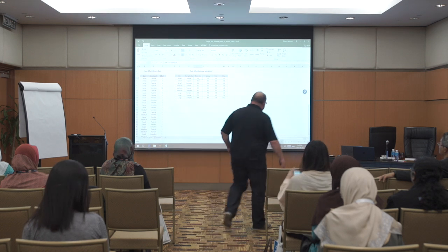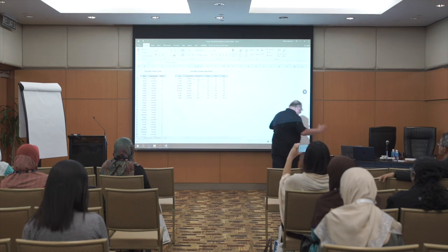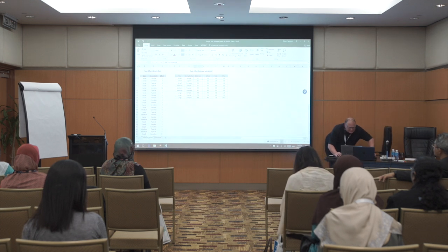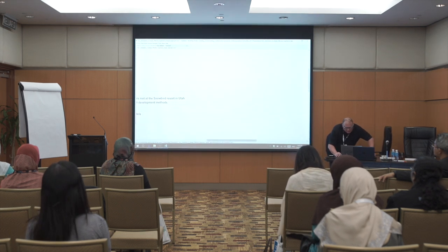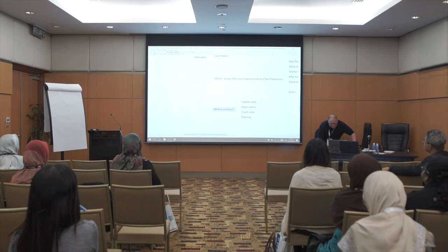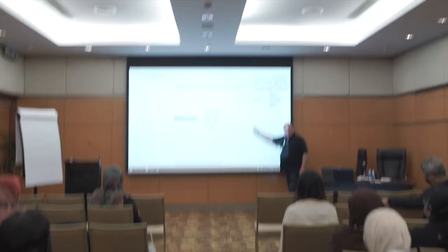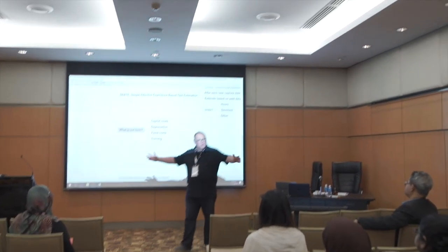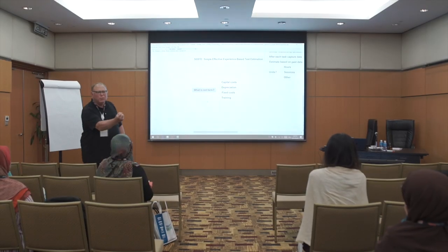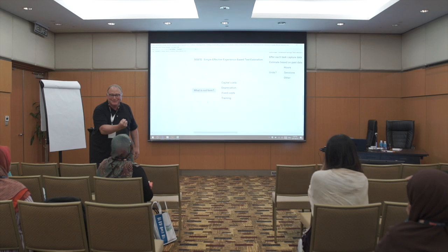What's missing from this method? Again, send me the email, and we'll give you the electronic copies of all this stuff. What is not there: we don't have capital costs. There's no cost of tools and equipment. All we're estimating is the work, the task.